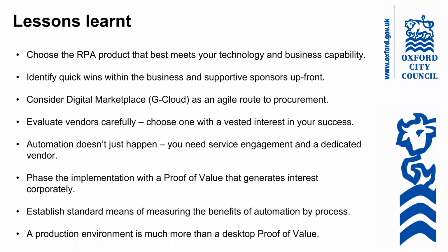So I would certainly recommend trying to build your own center of excellence, potentially tied into a data analytics team. We phased it by having a proof of value, which was necessary because that's what the board asked for. But I think it's a good way of testing the waters before you go full blown.